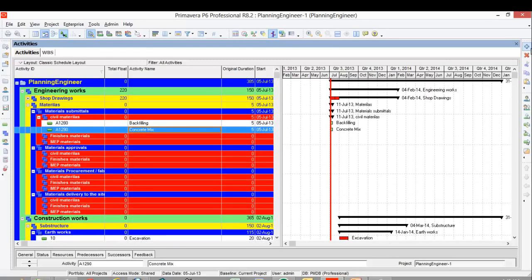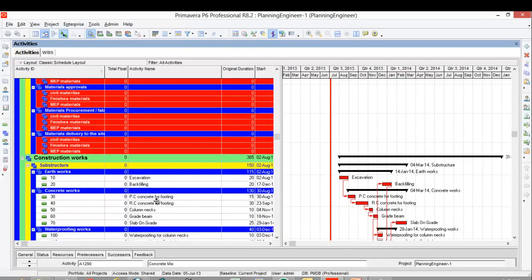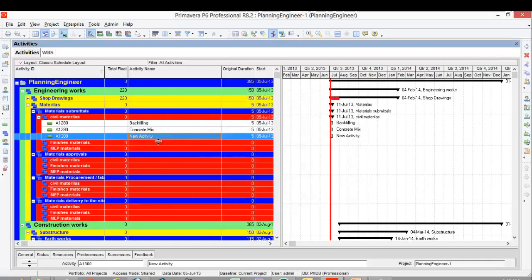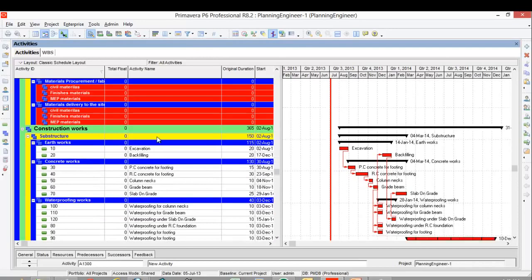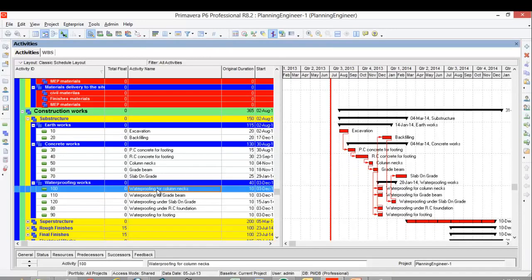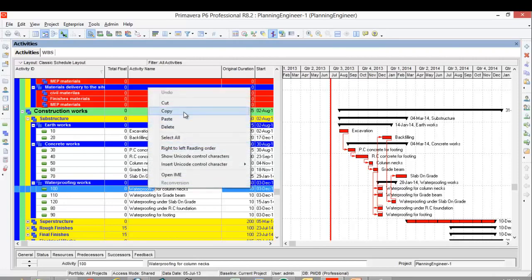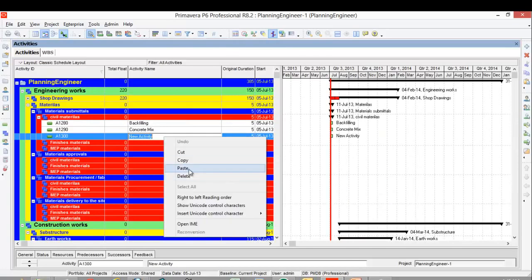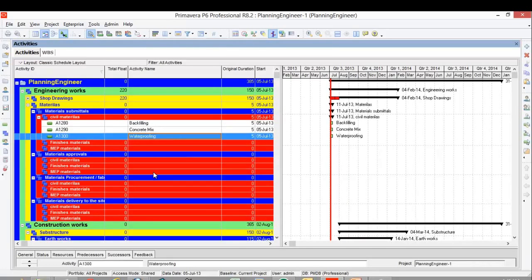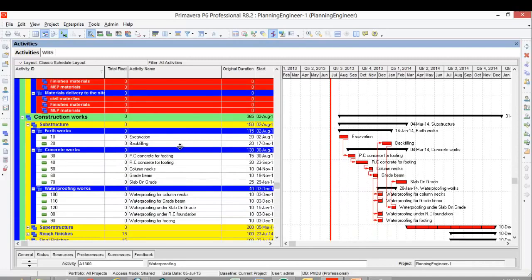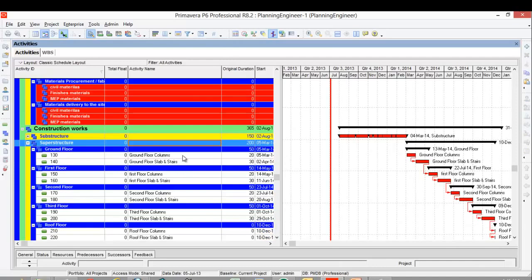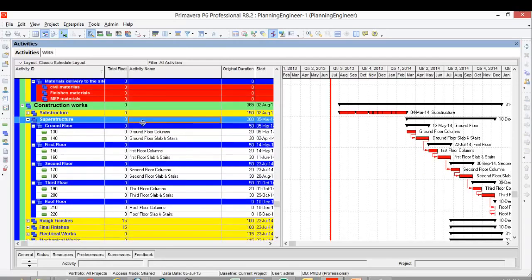We have here steel work. Reinforcement steel is usually standard steel, so we're using just the approved one. I don't think we should add it. We have the waterproofing. This waterproofing material should be submitted and approved. Then we finish the substructure. The superstructure is all concrete, so we don't have any materials.